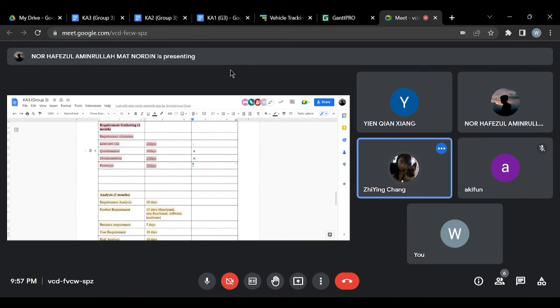Documentation starts with interview, so documentation does not have a predecessor. And for the prototype, it is after interview, so it's A.